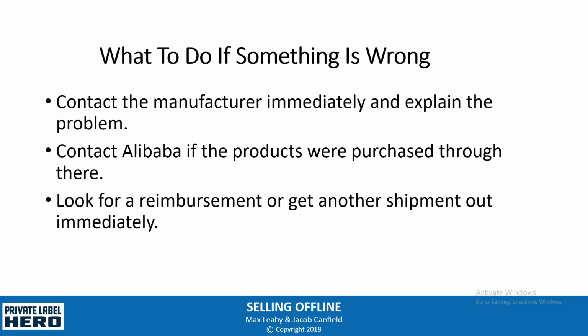The first thing you want to do is contact the manufacturer immediately and explain the problem. When we first started making fidget spinners, they all were breaking, and so we had them send out a replacement of almost $15,000 because they used the wrong material and they were all cracked and breaking. It was a very big problem, and it delayed our launch by quite a bit. The samples looked great, but the plastic that they used didn't work out well.